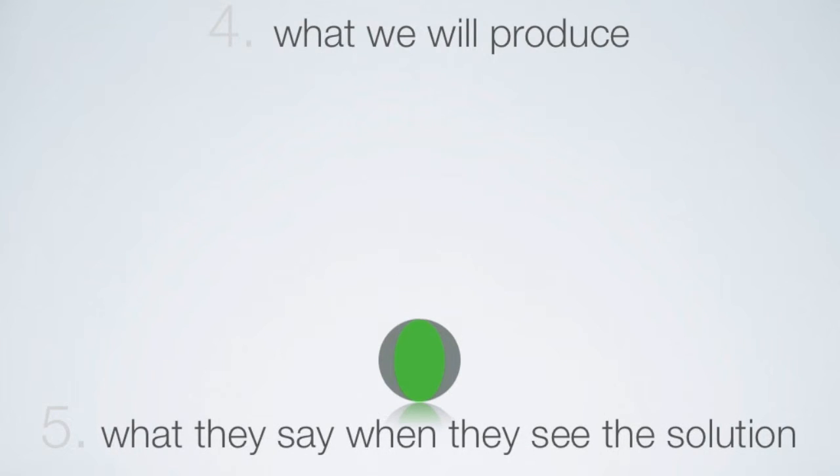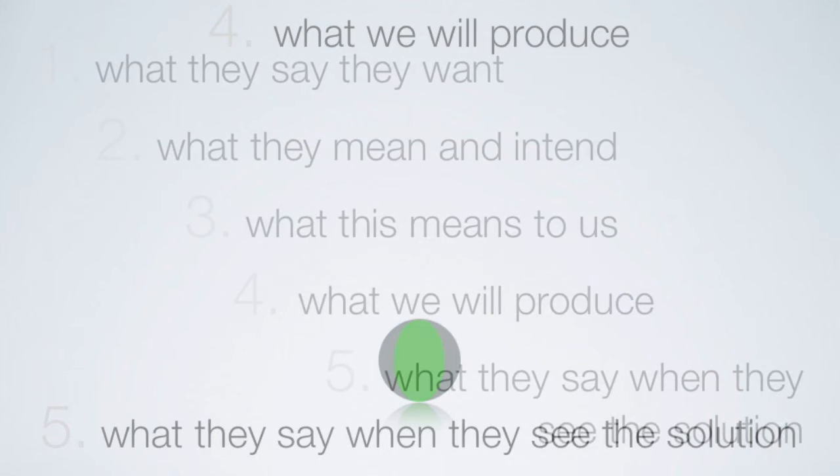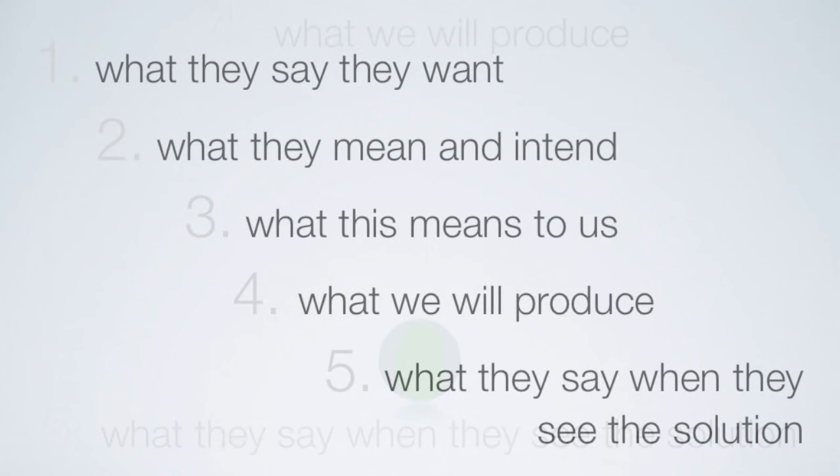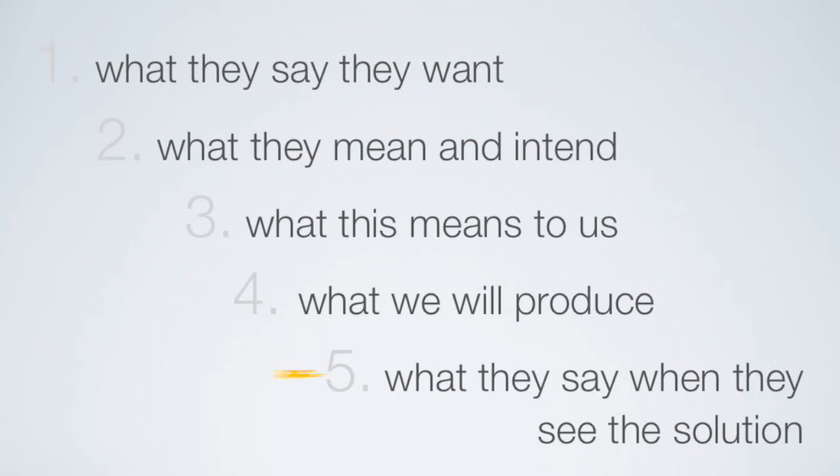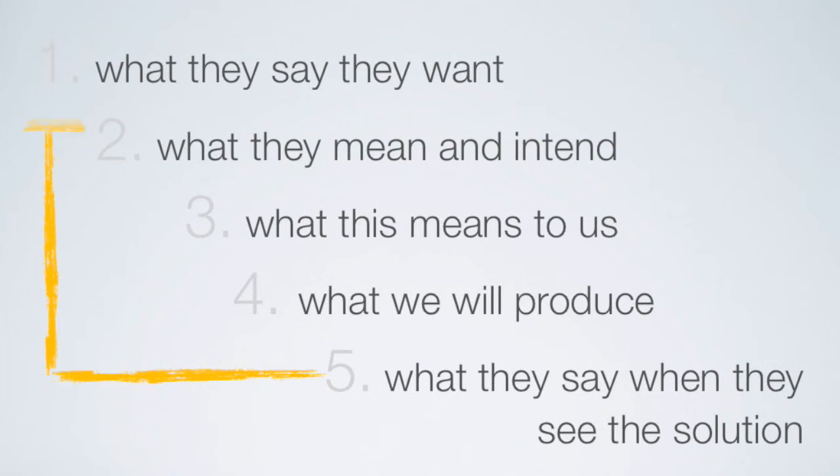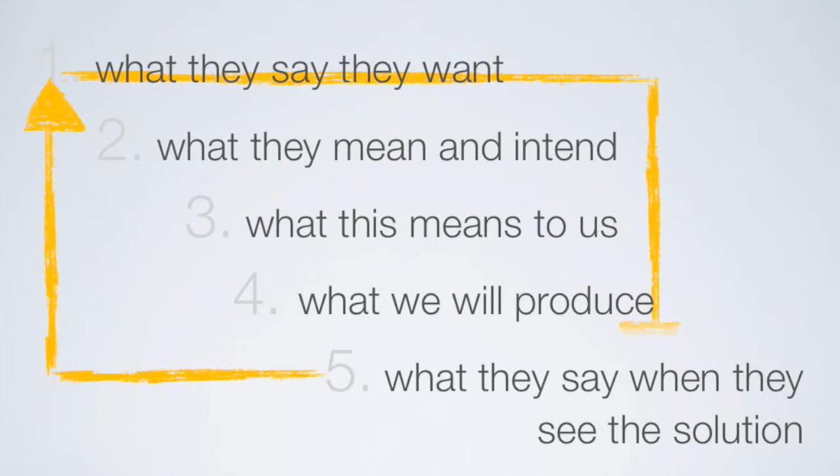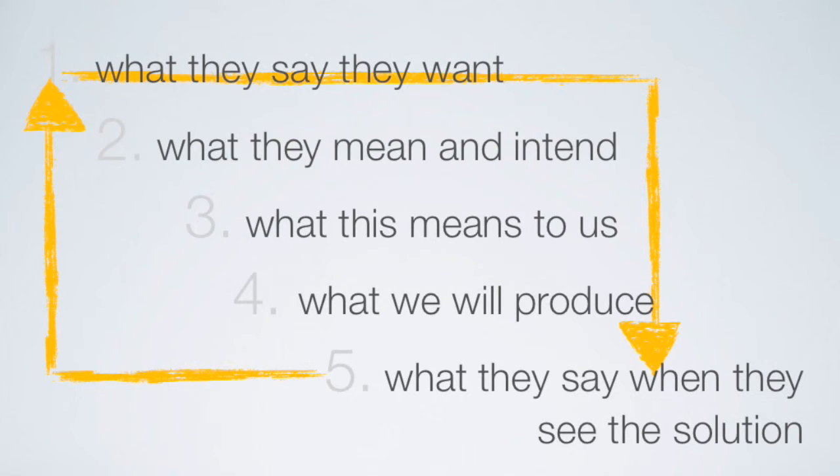What they say when they see the solution is where you show it to them. Best practice development encourages early prototypes and uses these to refine customer needs and wants. This process accelerates the cycles of learning and causes faster alignment between your product concept and the customer's needs. It is typical to see multiple iterations of this throughout the dev cycle. But it must be managed or it can be a recipe for endless feature creep and schedule delay.